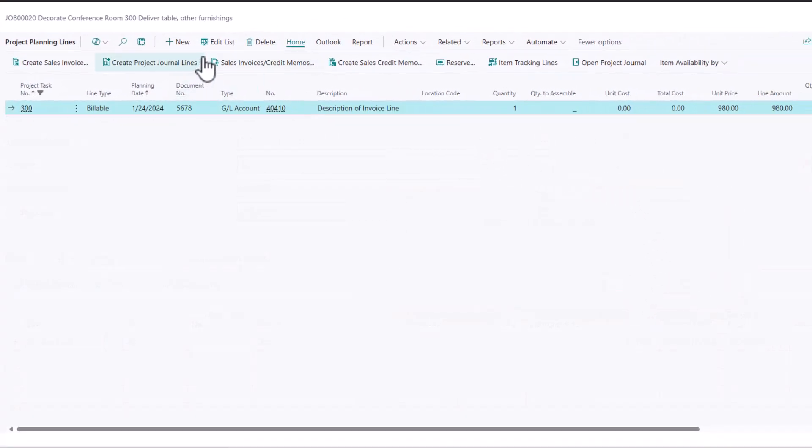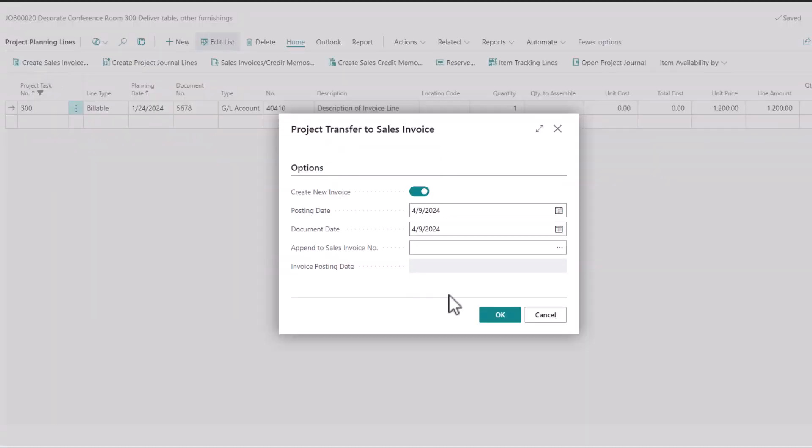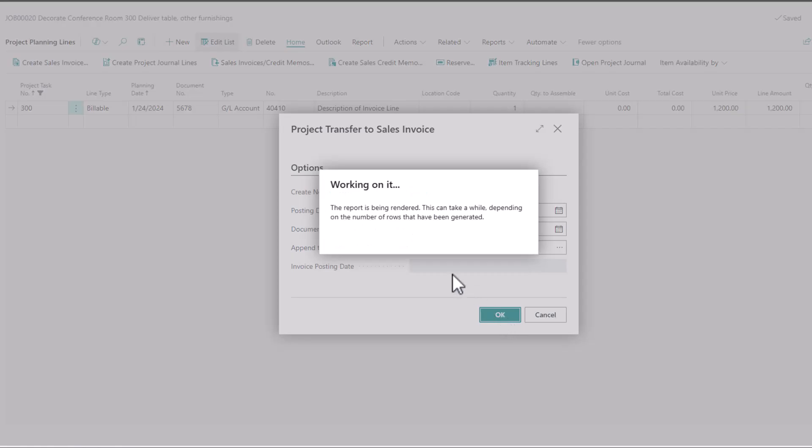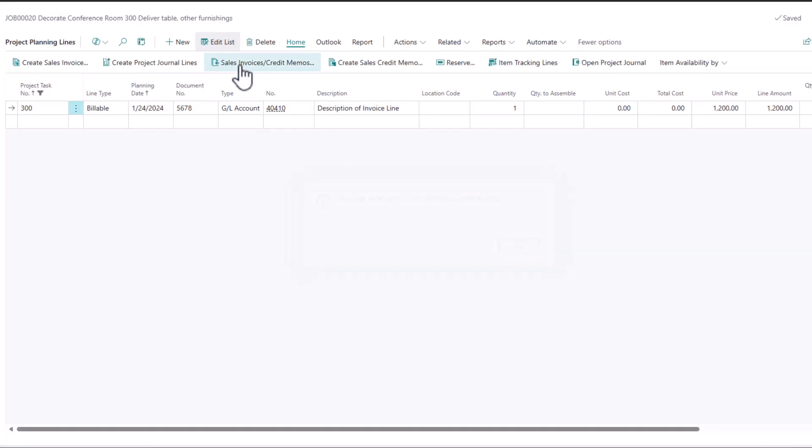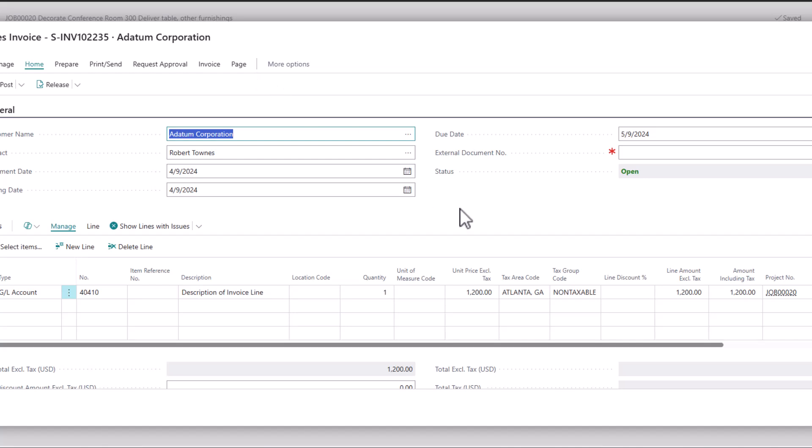I would come in, edit my planning line and say, okay, this now needs to be $1,200. And then I would create my sales invoice again. So it's the same process, very quick to make those kinds of changes. It's not like you're really slowed down a ton. And it keeps both the project and the invoicing that you've done in sync. So that's an important distinction there.